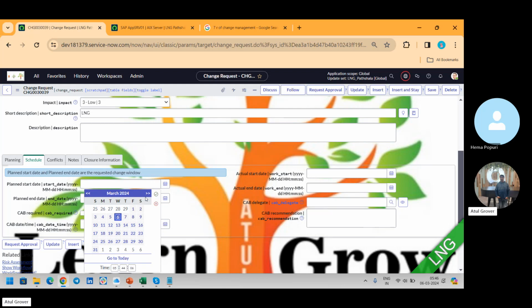I have full authority to say on the call, okay, go ahead, and just put this line in the chain that it has been approved by Atul over the phone at this time. And they will deploy this change. So they will deploy the change first and then raise this change later on. Because first it is important to fix, not the records.